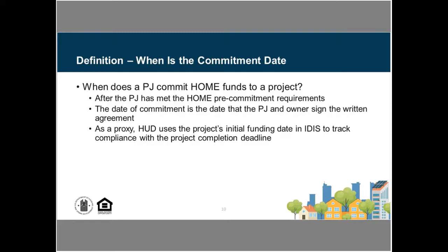So as a proxy to be able to track how we're coming with the commitment date versus our project completion date, IDIS is going to use the date where that project has been set up in IDIS as a sort of initial way to be able to track compliance with the 4-year project completion deadline.